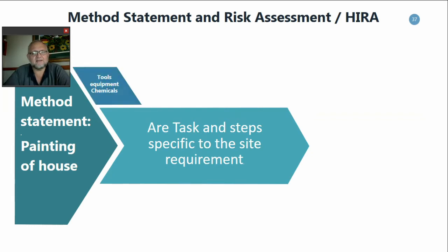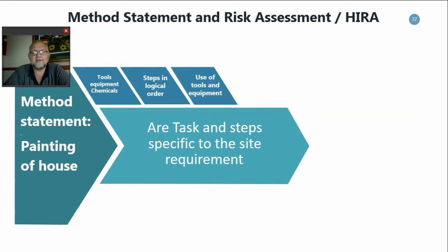In that method statement, you must mention your tools and equipment and chemicals, and the steps in logical order of how you're going to do the task. You must also be able to use the tools and equipment within the steps and how you're going to use it. The employee's responsibility must be clearly set out within your method statement.